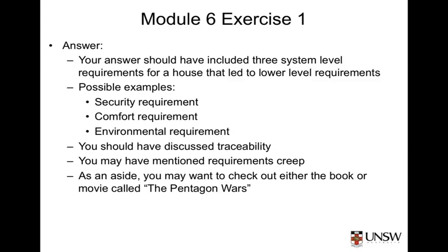When answering the question about backward traceability, you should have mentioned scope creep or words to that effect, because traceability in the backward direction helps ensure that the requirements have a reason for existing. That is, the requirement is there to serve a purpose that's associated with some higher level requirement. Requirements that do not serve a higher level requirement may be evidence of scope creep.